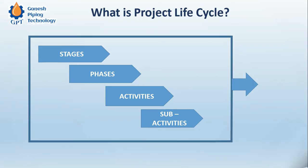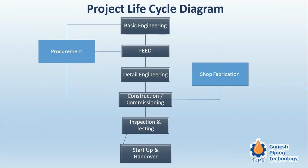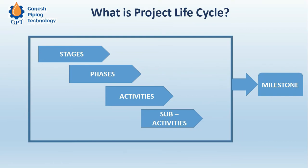When we complete a stage we achieve a milestone. Billing to clients normally takes place after achieving a given milestone. For every good practice you have to measure the development of a given project in terms of certain parameters — measurement is very important. A project is essentially a linear progression of certain activities from point A to point B.